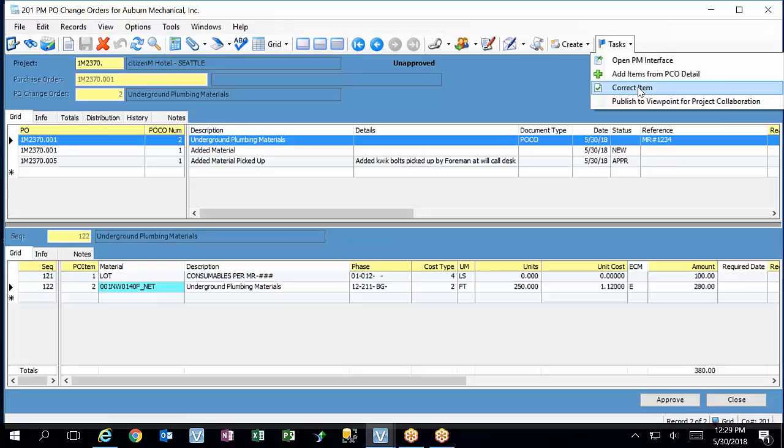Okay. So we'll need to do internal change orders to keep our process going. Yeah, and it defaults to external, but you saw the field where it says internal. So once it's internal, it disables the contract amount because it's assuming you're not increasing your contract amount. All you're doing is really making budget adjustments, which we did all the time because they're moving stuff around. And we used to have stuff in contingency phases, or whatever you call them, allowances or whatever.